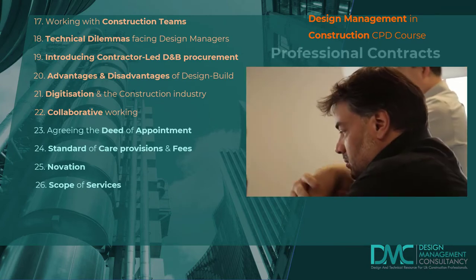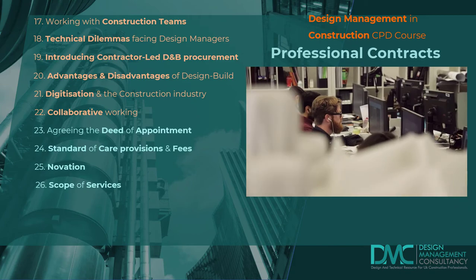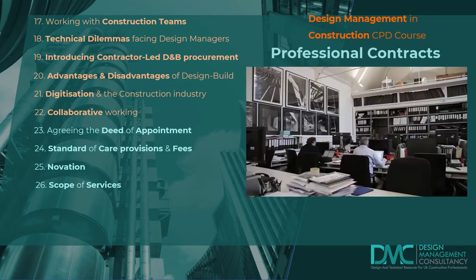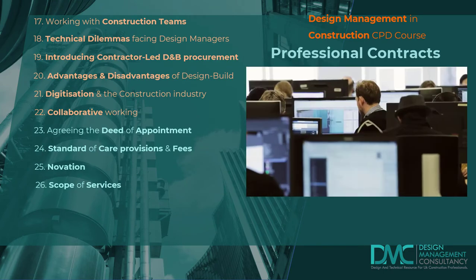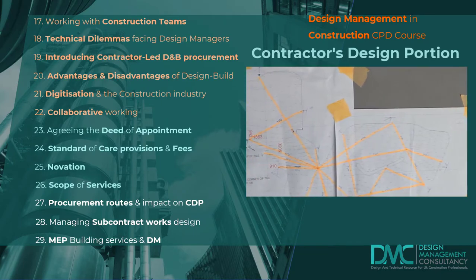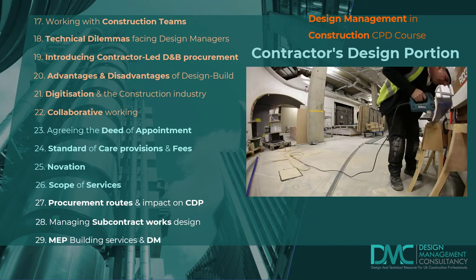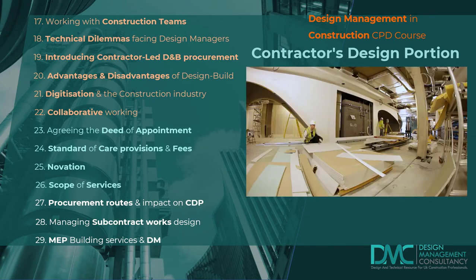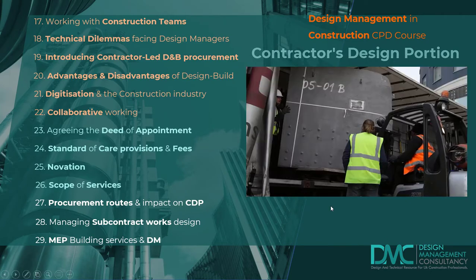Another important part of the job involves the appointment of architects, engineers, and other designers, and agreeing the clauses, fees, and detailed scope of services with each one. Integrating the design information produced by specialist subcontractors is also an important part of the design manager's job. This includes looking at procurement of subcontract works and working closely with the surveyors and the commercial teams.